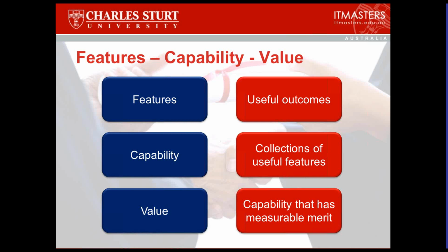So you want to have enough people working together. You don't want to break up and have 20 teams of 3 people. That would create a communication matrix that could be a bit of a nightmare, and unnecessarily so. How big should a team be? Well, most people will tell you that once you start to go above 10 or 12 people, you start to get into situations where people will naturally function in discrete coordinations within that group.